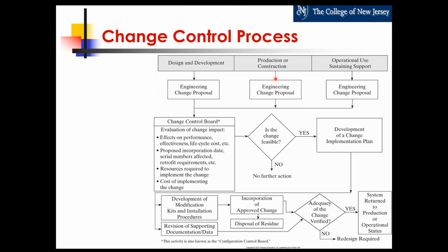Now, the idea is that all the changes, best case, all the changes happen here. And if you normalize the cost of a change to 1 here, doing it here is going to cost you 10 times more. Here is going to be 100 times more. Okay? That is a good rule of thumb to take seriously because it has dire implications.